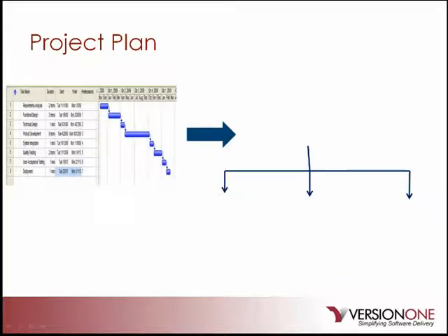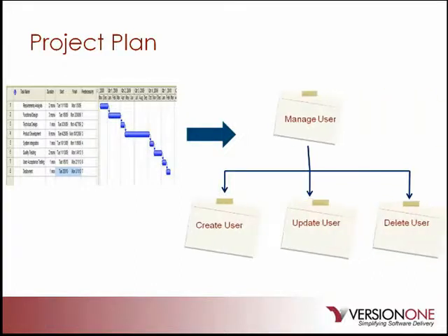So you have a transition from a large work breakdown structure at a task level to a feature breakdown structure at a story level. If you have a set of requirements on a traditional project, the project manager is going to use up a lot of time creating a task breakdown for the entire project that changes all the time. So we see that, as I mentioned earlier, as wasteful activities within the Agile framework. With an Agile approach, we keep the focus on the priority of the features. Again, we may break down these larger features into smaller ones, but that is as far as you go. It still allows you to gain insight into when the project will be completed. We'll touch on this later, but first let's look at what a story is.